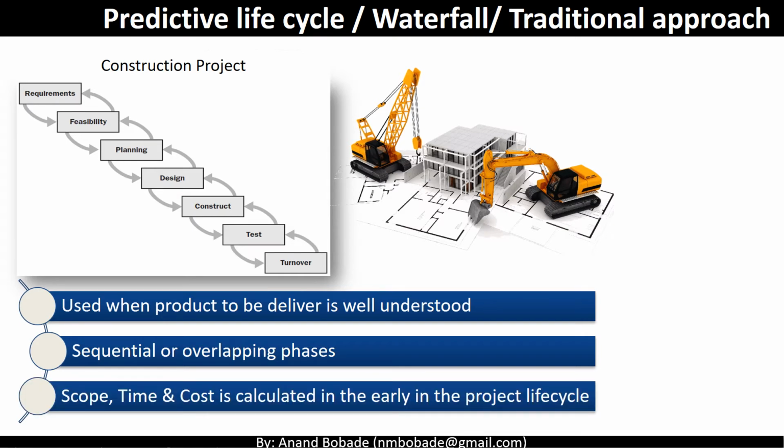The three main project constraints, time, scope and cost, are all determined at the detail level at the beginning of the project. Waterfall was great when I used to manage projects where requirements were clear upfront and didn't require much stakeholder involvement. They are mostly involved at the beginning and at the end, or when a scope change needed some approval. The downside is that waterfall is pretty inflexible when it comes to changes late in the project and therefore leads to significant cost increase when rework is needed.